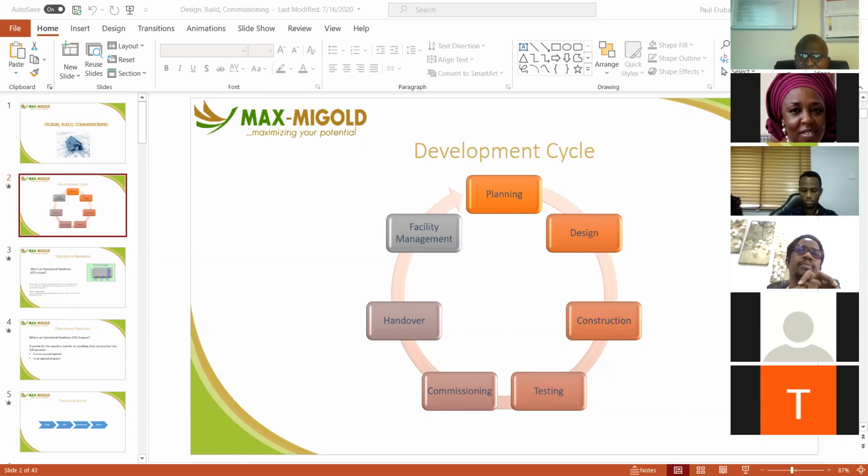Okay, that means there can be significant differences. Oh yes. Well, the first two may not have differences, except for variations. During construction drawing, variations are captured. If it is just to blow it up so they can see more detail, there will be no difference from the design. But if it is to show the impact of a variation, then there will be a difference between construction drawing and design drawing. But the as-built drawing can be very different from both of them.